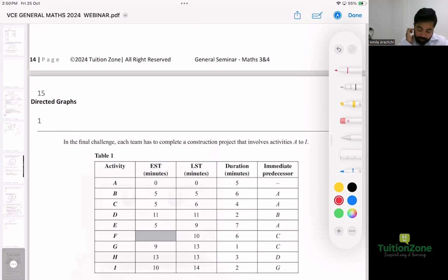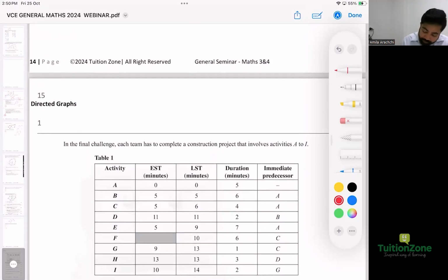The good practice: we need from A to I. So you need the A to start the B and the C. And also we need E as well. So a bit tricky. So use a pencil and draw it, because this diagram you might need to change a few things halfway through.